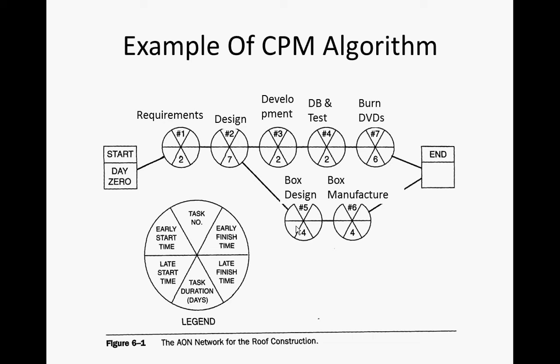That is the minimum of those two. Remember we did maximum over here earlier. This is the minimum. These two are coming together here, but it's going to be the minimum because we're not going to be able to finish the project on time unless this guy can finish by a time required by any one of these guys. We can't finish this later than the earliest late start time of any of those guys.